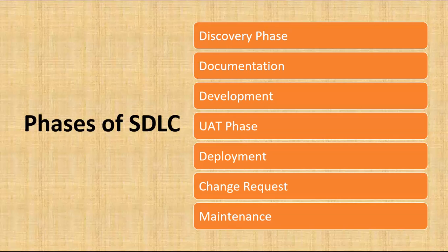So that is done. And before going to the development stage, take the complete notes or prepare a tracker, prepare a template. What are the things you require for development, like orchestrator setups, licenses, robot, login credentials, application credentials, system credentials, all these things you take from the architect. And you act as a bridge between the technical team and the business team. Take from the technical architect and produce to the technical business team.